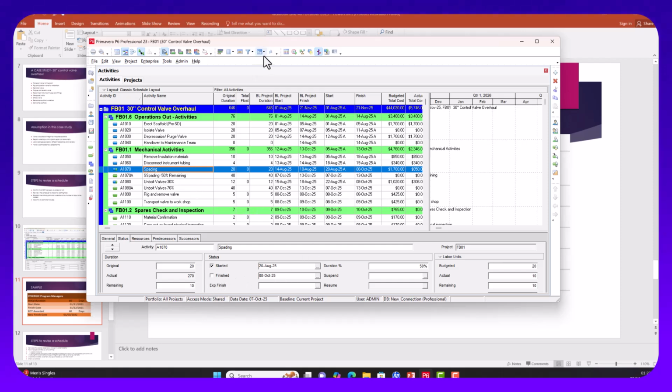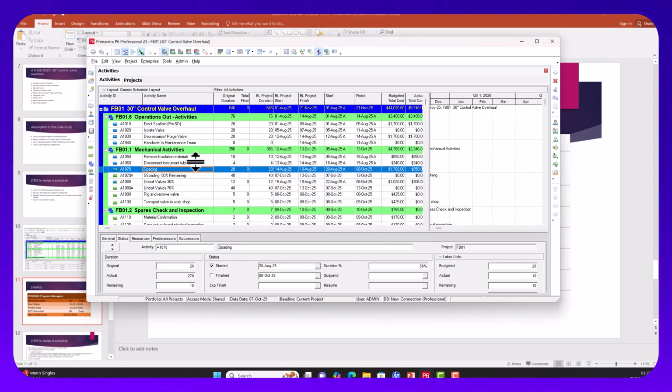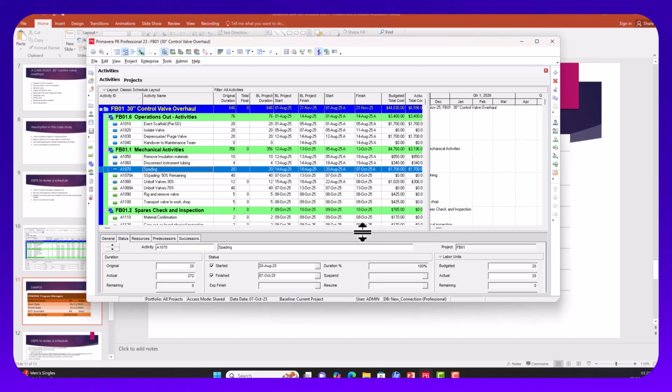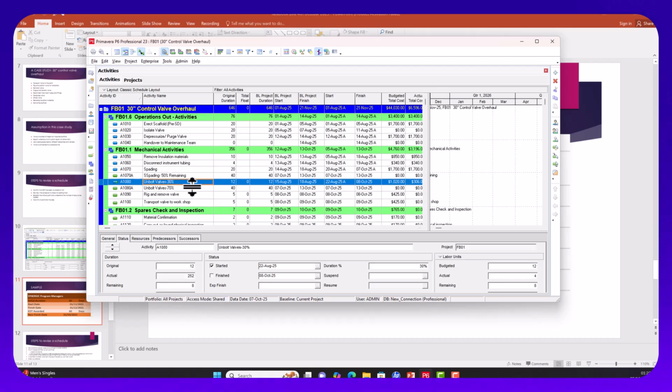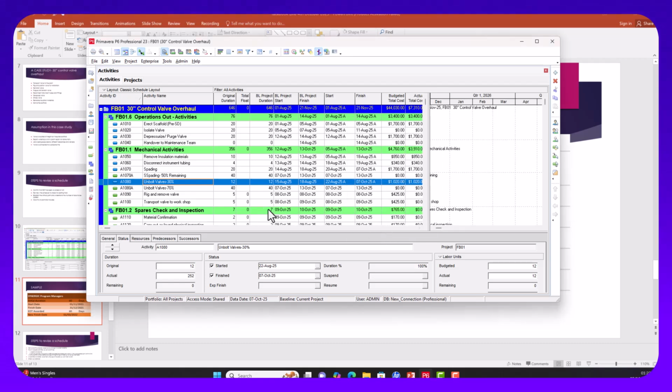And what is our data date? Let's check what our data date is. 7th of October. So I'm closing them on the data date, 7th of October. So I close this at 100. 7th of October. And I'm closing the next one, this first 30%, on the 7th of October. Good. That's done. So that is sorted. So I have these two new ones now.